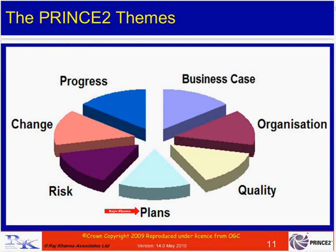The managed by stages principle is supported by the plans theme. Within a project we have a project plan, a stage plan, and a team plan. The rest of the project can be broken into multiple stages depending on the level of risk, and each stage plan is planned in detail towards the end of the previous stage. The managed by exception principle is supported by the progress theme, which covers mechanisms we can put in place — such as regular highlight reports from the project manager to the project board, and regular checkpoint reports from the teams to the project manager. With these in place, respective levels of management can manage by exception.